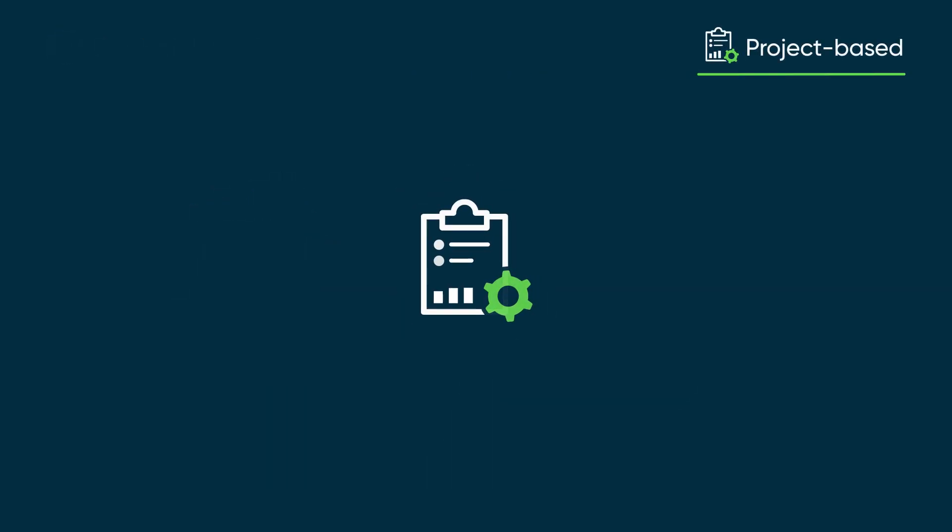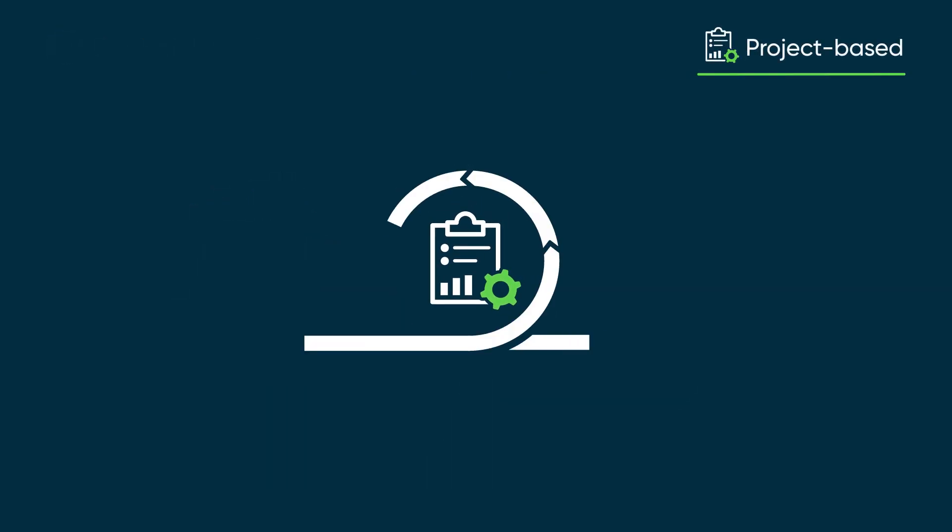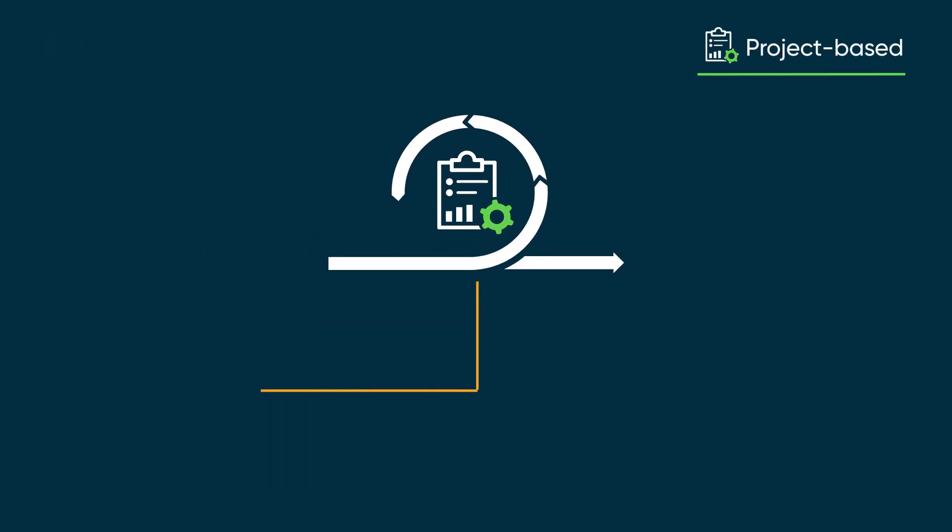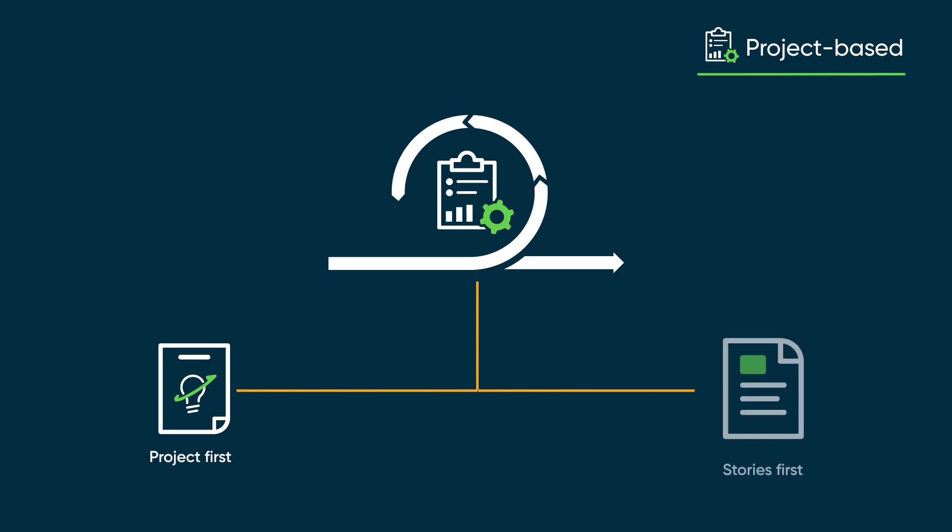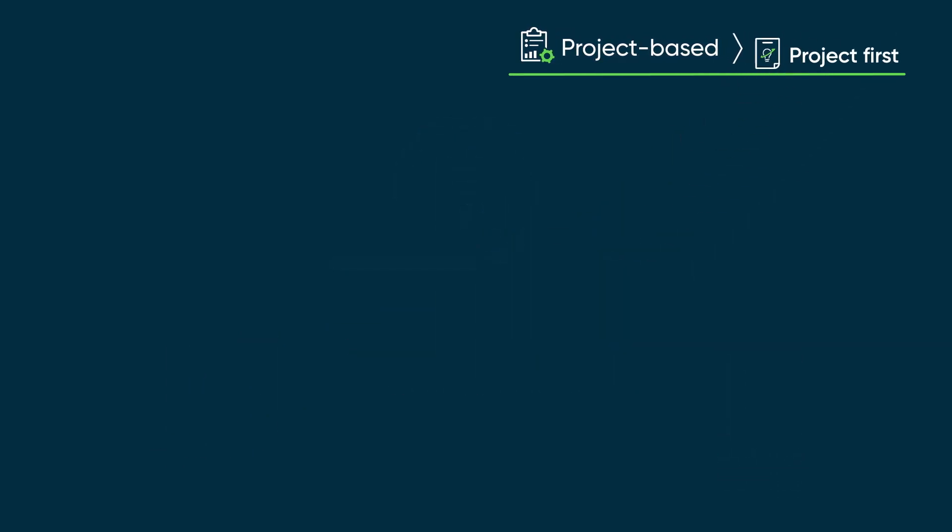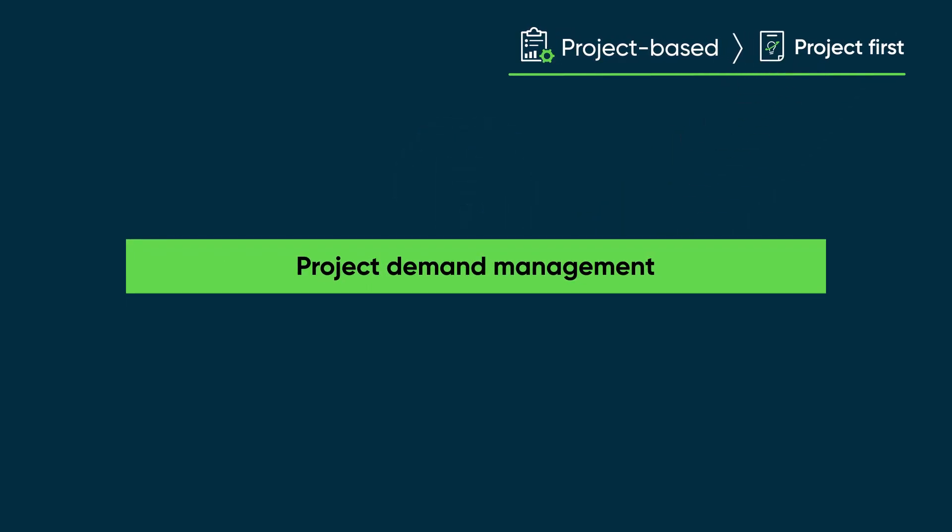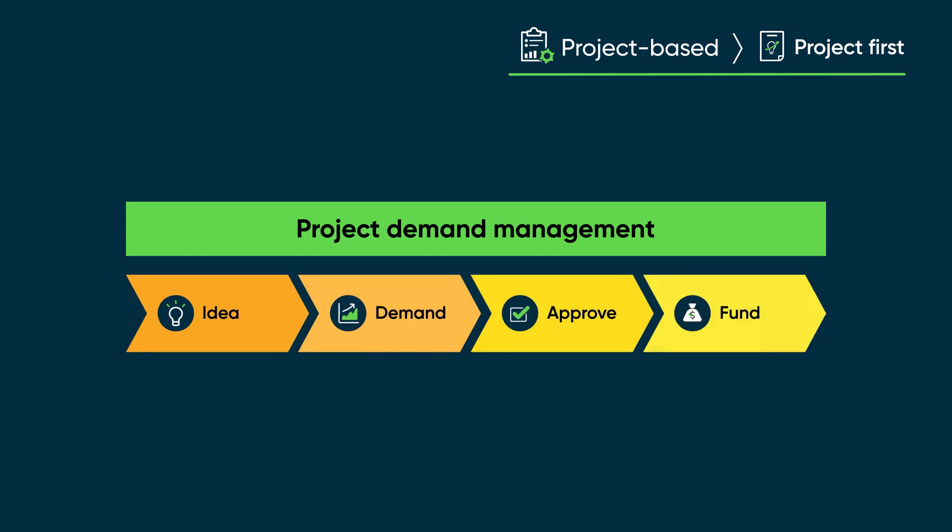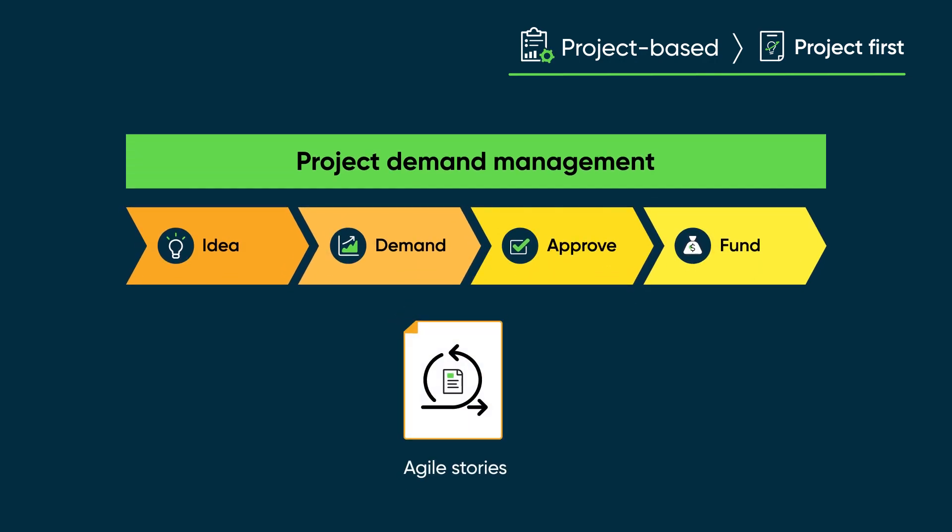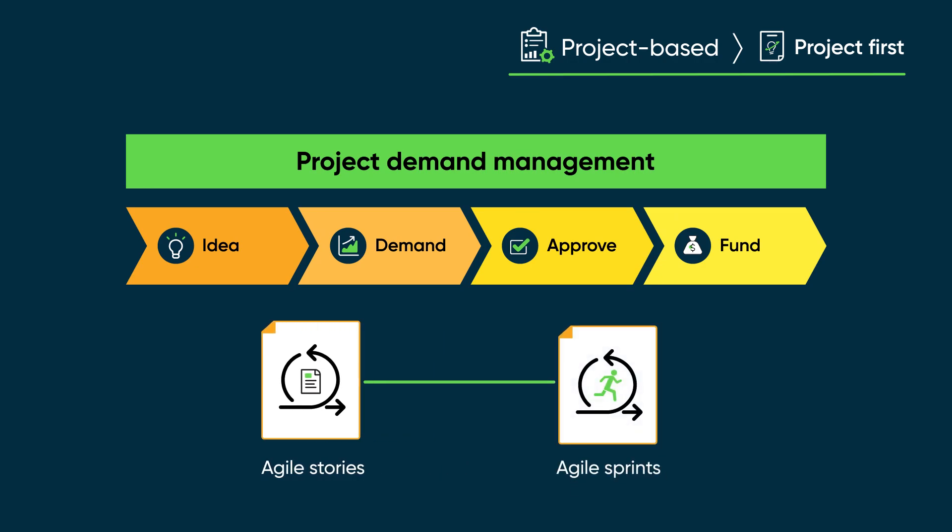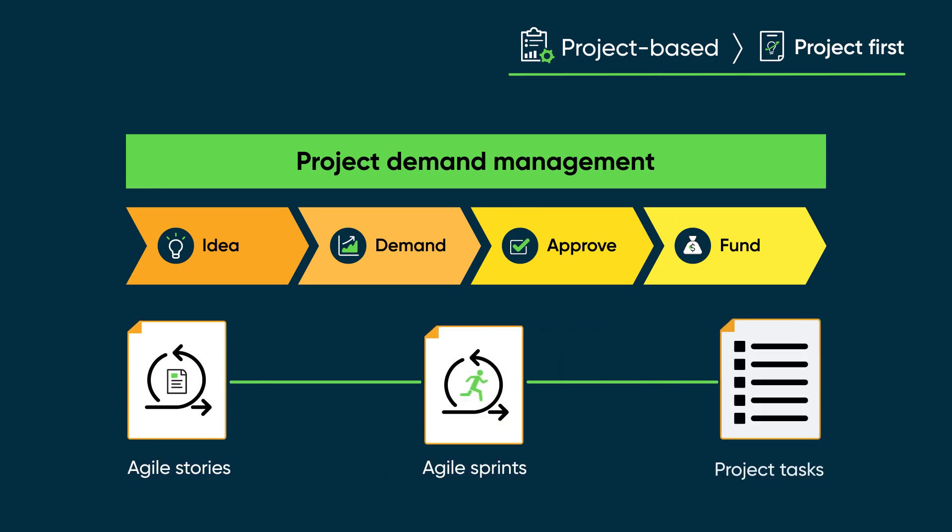There are two standard ways to create an Agile project: project first and stories first. In project first approach, we use the demand management process to create and fund a project. Then we carry out the project using a mix of Agile stories and sprints and traditional project tasks.